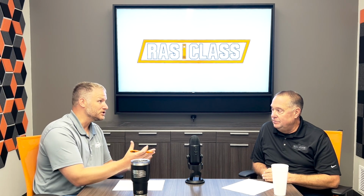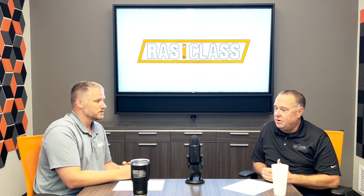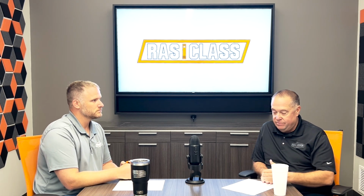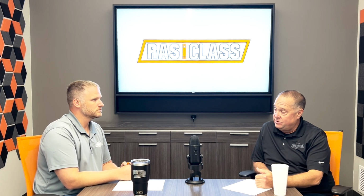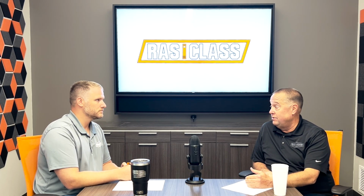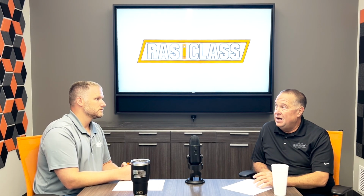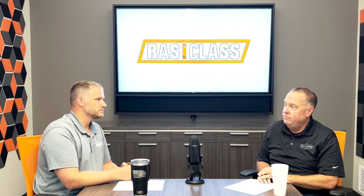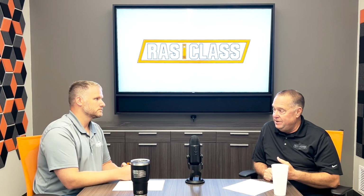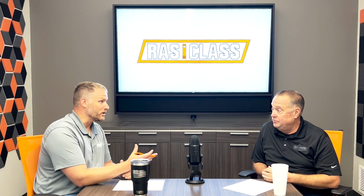So it sounds like shipping logistics could be the difference between getting a boiler tomorrow and getting a boiler next week, right? Exactly. And our location here is a big advantage for us for having the units that we do. If they've got to go from the southeast, the east coast, or the west coast, and you're shipping a water tube, you could see $25,000, $30,000 freight each way. In our area, the highest freight we've ever incurred was probably $6,000, $7,000 each way. So our freight inbound and outbound is less than one way. And that's for large boilers.